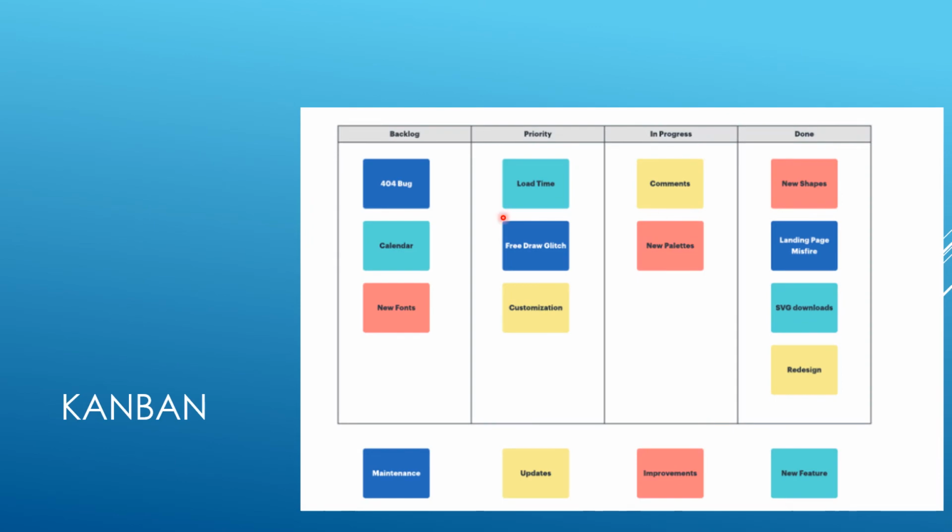Another method is Kanban. Kanban is a scheduling mechanism founded in the Toyota Manufacturing System. It's a simple visualization technique along with flow-based operations. Wherever you see flow-based operations, you can use Kanban. In the software industry, production operations widely use Kanban. It's a flow of work items. It starts with a backlog, then it gets prioritized, it's in progress, it's completed.